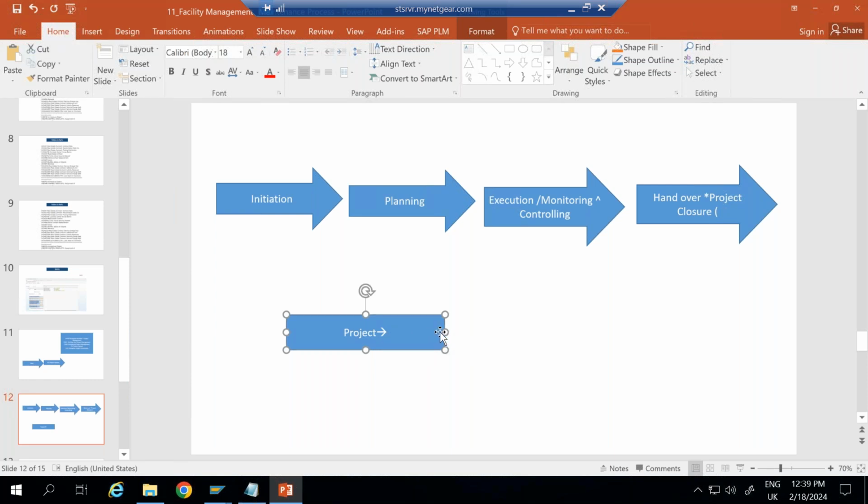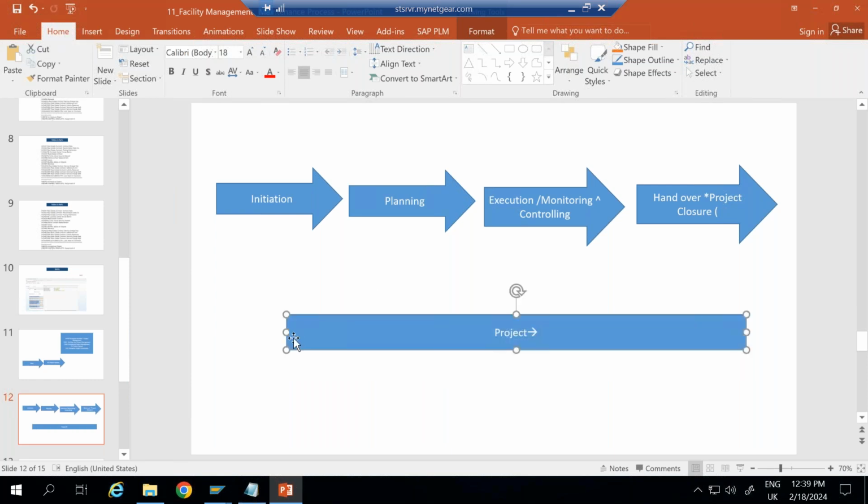Yeah, it's better. Okay, so until the handing over of your product, your project cost, which is going to be incurred in project objects like work breakdown structure or network activities, will be settled to AUC, asset under construction. And once your product is ready, then it will be transferred to your asset. Okay, so asset is part of asset accounting. So here, the asset will be created once your final building is ready. So the building is your asset, or you can create an individual rental unit as an asset. And then the individual cost which is incurred on that particular WBS, you can settle to the asset.